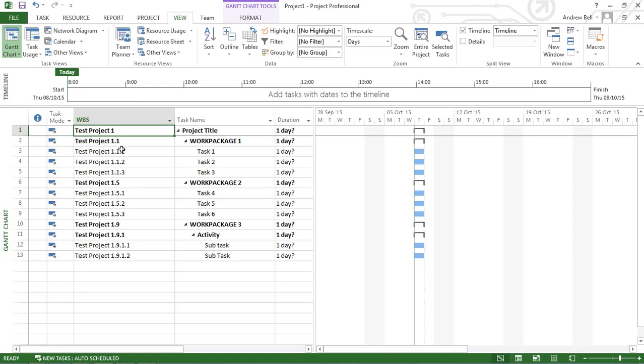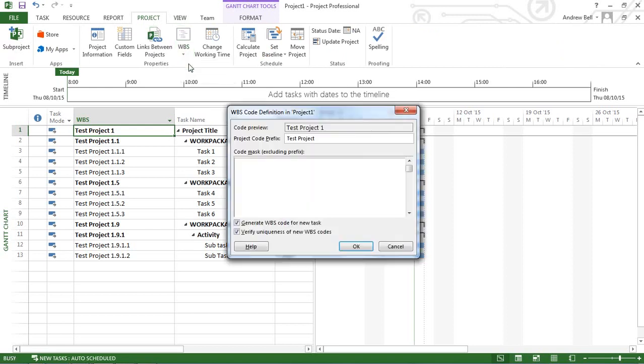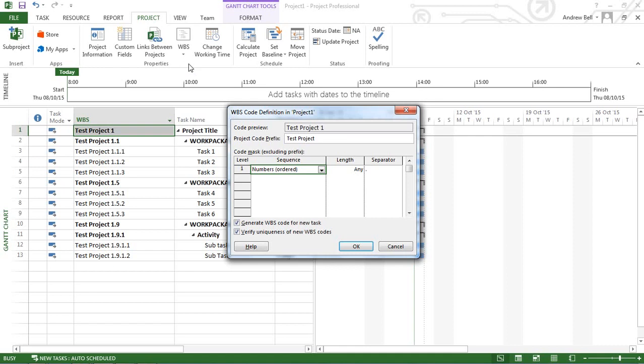Let's have a look at how I did that. I would have gone to the project tab on the ribbon and clicked the WBS dropdown to define the code. And there I've got it, it's called test project. And I'm going to use numbers in an ordered sequence.